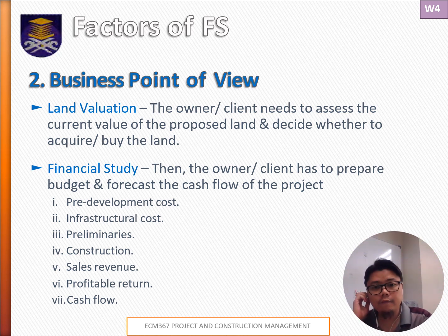So these pre-development expenses might include the likes of real estate consultations, the expenses associated with obtaining permits, or the cost of architectural and engineering design. And then the infrastructure costs, it could refer to expenses related to building roads and installing sewer, water, and electrical systems.